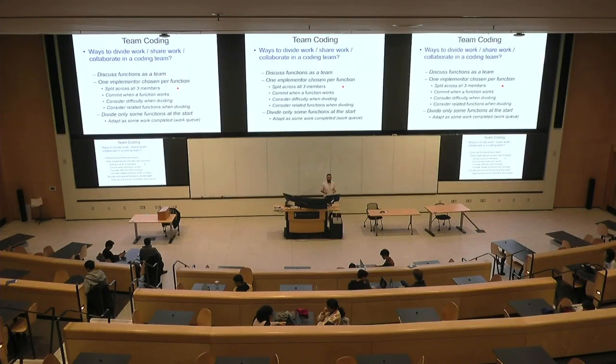So you can probably start with splitting up, let's say, 2/3 of the functions, and leave out the last third until the end. Not necessarily until the end, I mean until someone finishes, and then they can take up that extra function or 2.